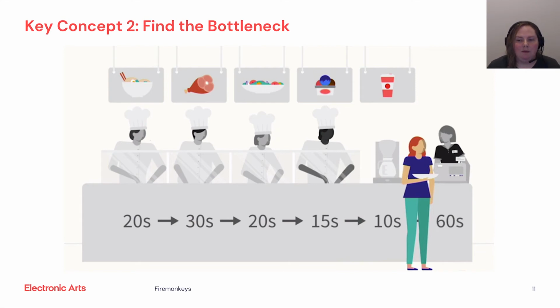If you're interested in the math behind identifying a bottleneck, look up Little's Law. Or you can shortcut it, like a lot of Kanban teams do. Just ask the representative of each swim lane, how many items can you comfortably have in your queue at once? Then, you place a constraint on each swim lane regarding how many items they can put forward. This creates constraints between your swim lanes that prevent the bottleneck from being overburdened.